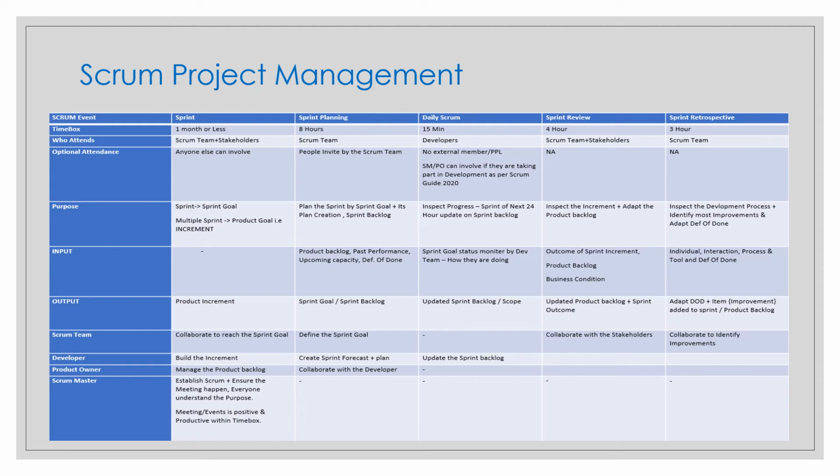Then in that case, the product owner will take a decision to make it early, which is very rare, but it will be discussed with the team and it will be done. And if the objective of that software is very outdated in the market and it has no value after the second or third week, then based on the client request the sprint can be cancelled. So the company can decide based on a change of direction from the organization or the client.